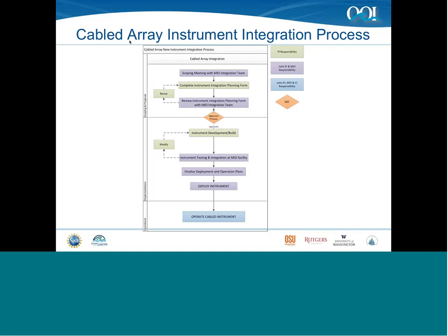Typically there's an upfront scoping meeting with the MIO, Marine Implementing Organization, and that would be us here at UW. We would have a form for you to fill out to give us general information about what your instrument's supposed to do, and then we could work through that with you to make sure that it's feasible to connect it to the cable.